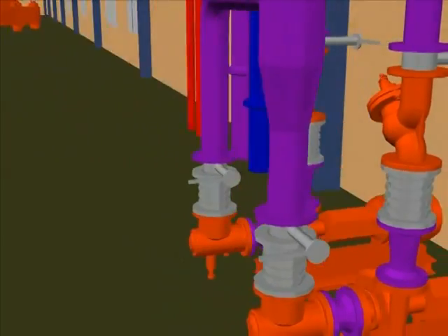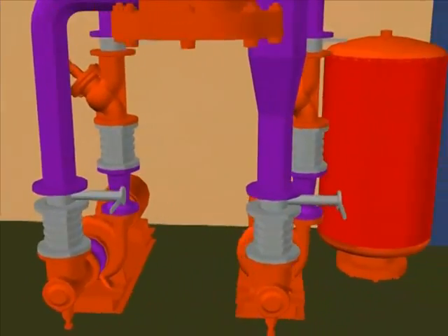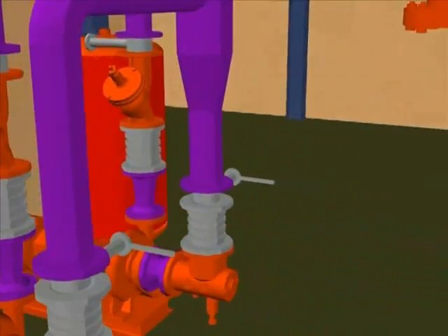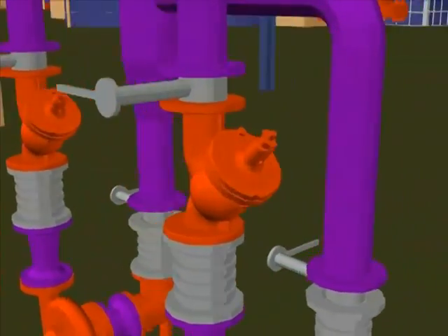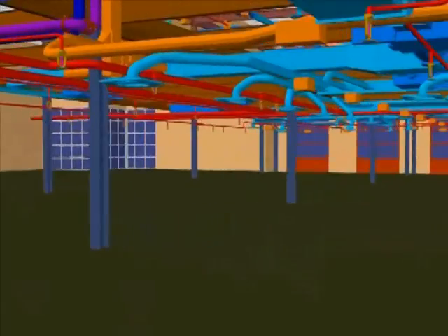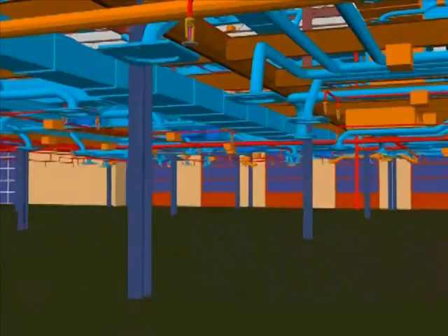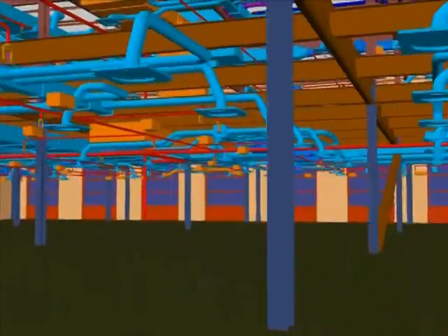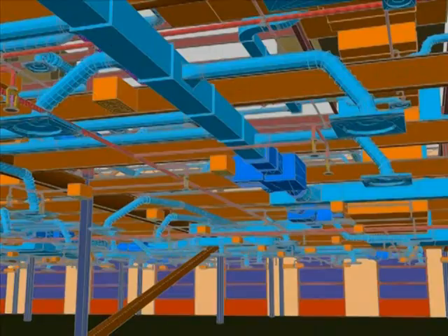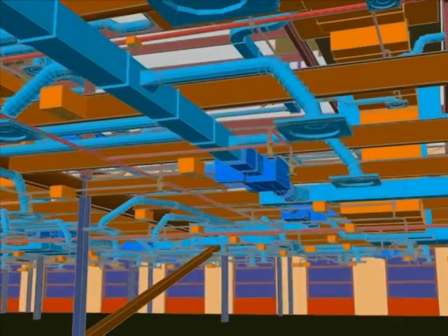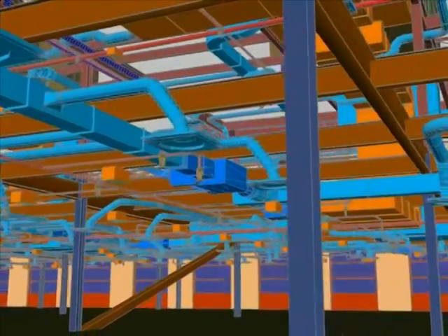Space conflicts are a given between building trades. Do you want your tradesmen standing around in the field trying to solve a coordination problem on the job, or do you want it identified prior to construction? An hour or two in the planning process can save 40+ man-hours in the field. Needless to say, additional hours spent on meetings in the field to solve such issues are wasted time.